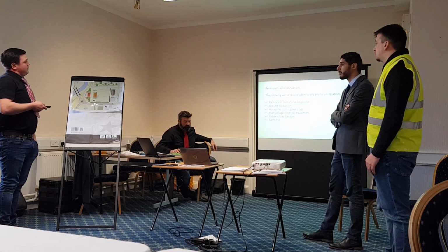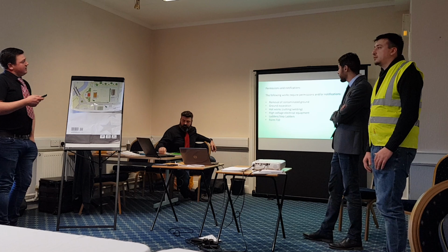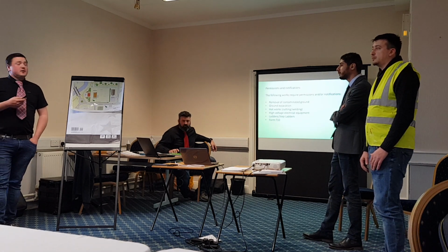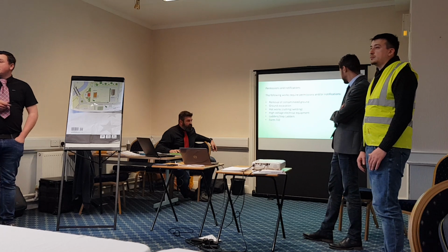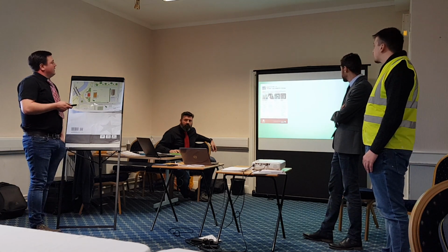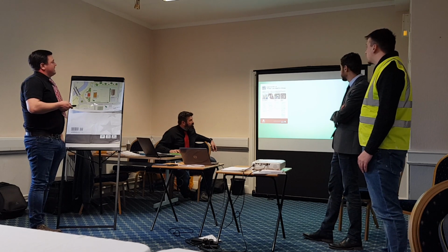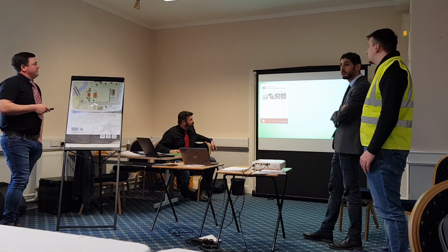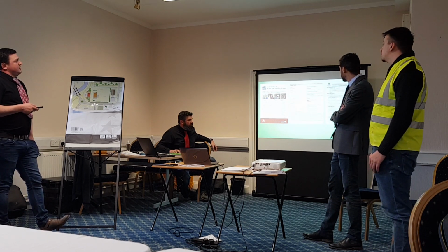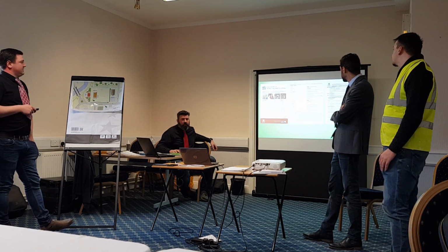And obviously your Form F10, which we are required to submit to the HSE to notify them about the work. We can do this for you, or you can do it yourselves. The health and safety poster will be displayed on the health and safety boards on site, along with the insurance certificates and the F10 once it has been received.